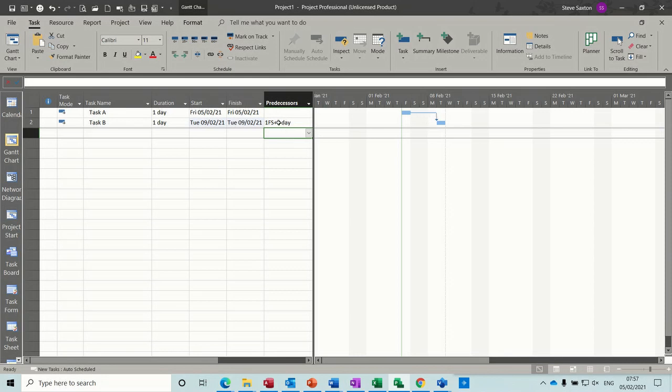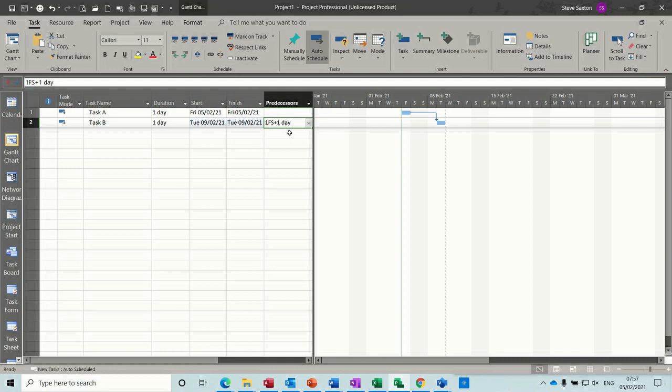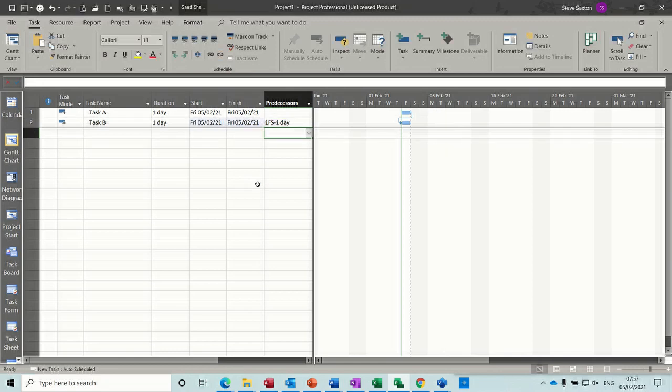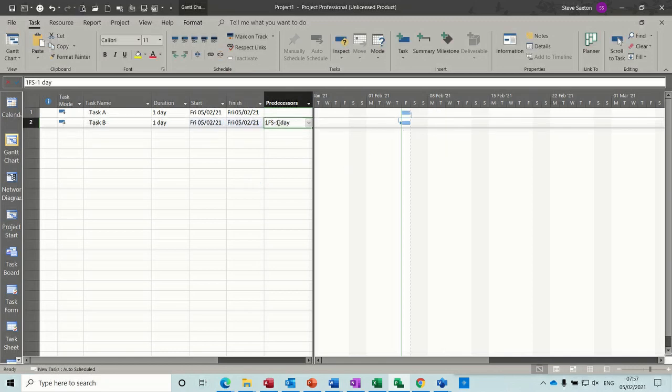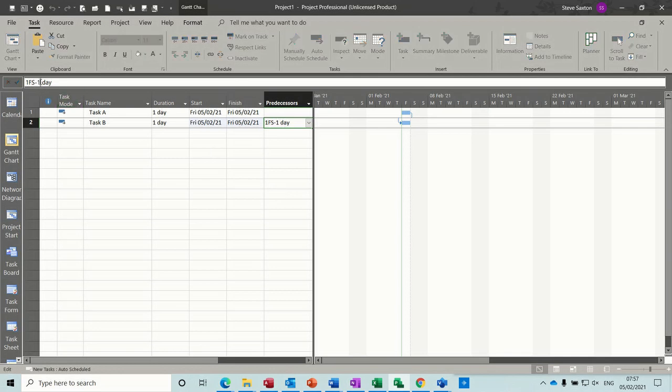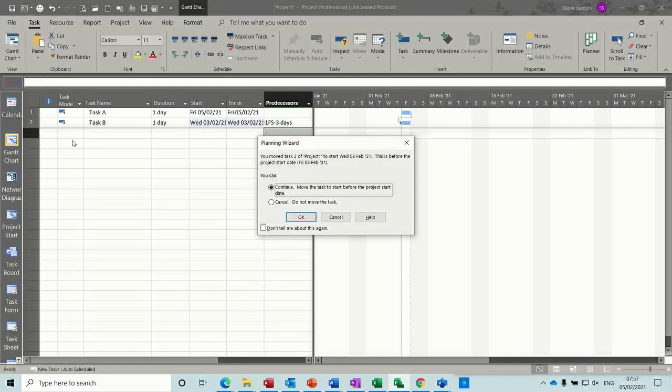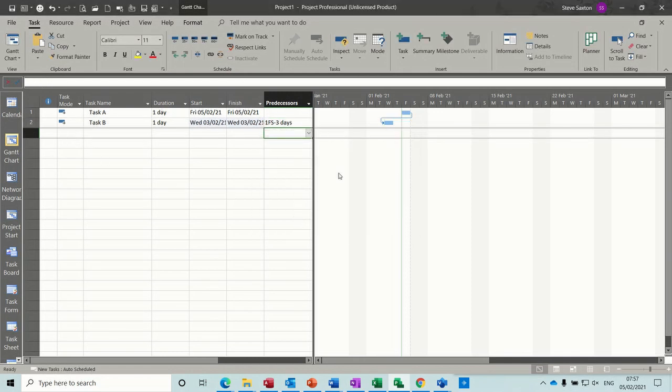Now, if I change that to a minus, 1FS minus 1, you get the lead. So I'll do that as minus 2. Now I've got my entry bar up here, so I'll do minus 3 actually, and go forward. So there is the time on that.